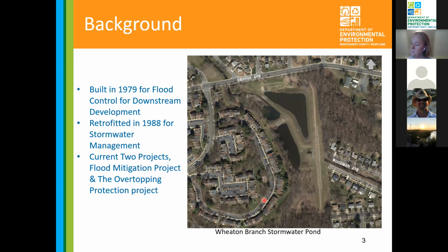So that project is several years away, and obviously the overtopping project is going to happen a lot sooner. They won't overlap. The overtopping project will probably be underway next year at this time, and be completed by early to mid January of 2023. So I think those are the only two projects that could be referring to.